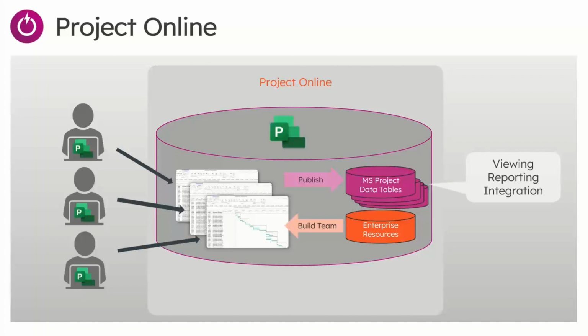The work assignments, again, are published to enterprise database tables in Project Online, and this is the foundation for resource management. So Project Online solves that need for an enterprise view of all of these individual project plans. Rather than project managers maintaining their schedules in individual desktop files that are disconnected, that we can't get to, Project Online brings all that data in.